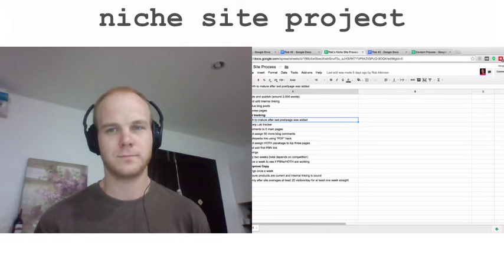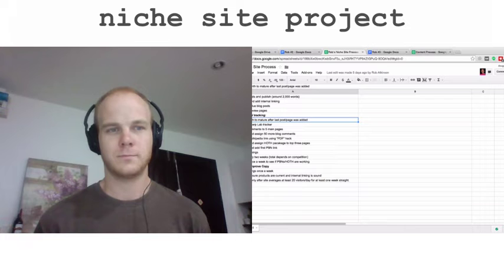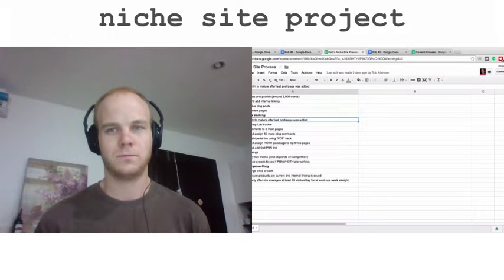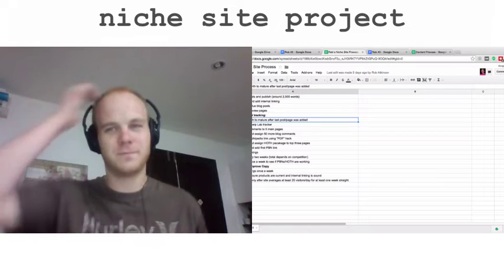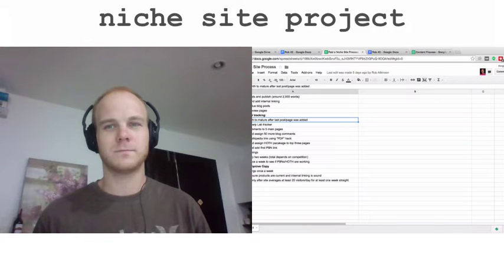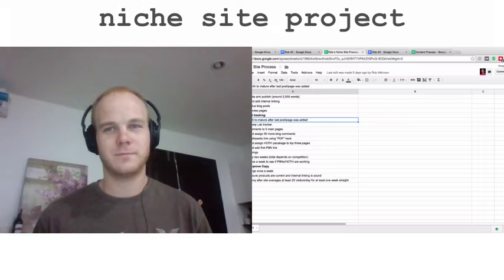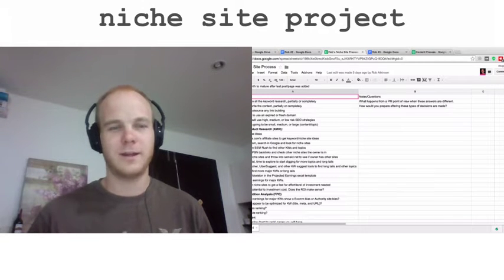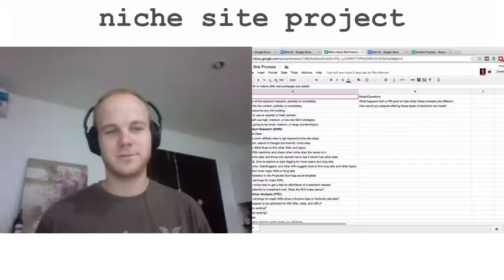You should probably have a pretty good idea of when you're going to finish too, because if something's dependent on that task finishing, it tells you when to start the next one. That's the essence of a project plan — what you're going to do, when you're going to do it, who's going to do it, and any dependencies. If you have those four or five things, that's pretty much all you need. Going through the exercise of listing out tasks and knowing when you're going to do them — even if you don't follow the plan — means you will have thought about it more intentionally.